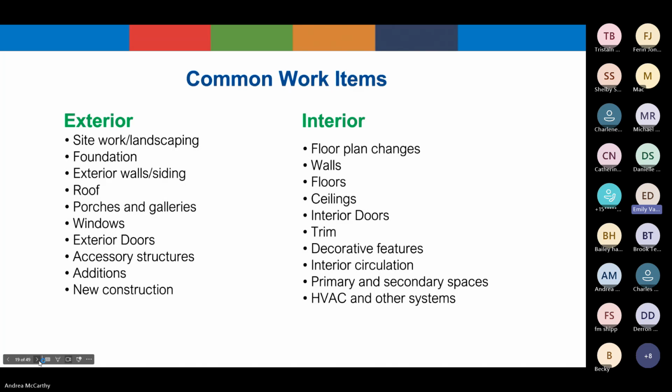Some buildings may have housed multiple uses with different conditions existing in different spaces. In this case, it may make more sense to divide the narrative spatially. For example, in a historic school building, the entry lobby and corridors, classrooms, auditorium, and gymnasium all have very different finish treatments and interior characteristics. So the work items could be organized by use instead, with the corridors being one work item, the classrooms being another, and so on.